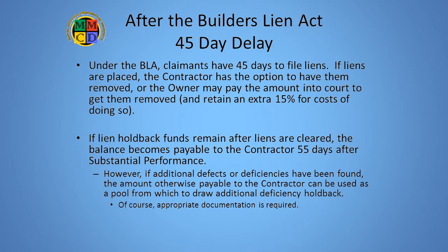Should this happen, the normal requirement for appropriate documentation to both parties must be completed by the CA, as it is only the CA who can determine what the two parties are entitled to as far as payments and offsets.